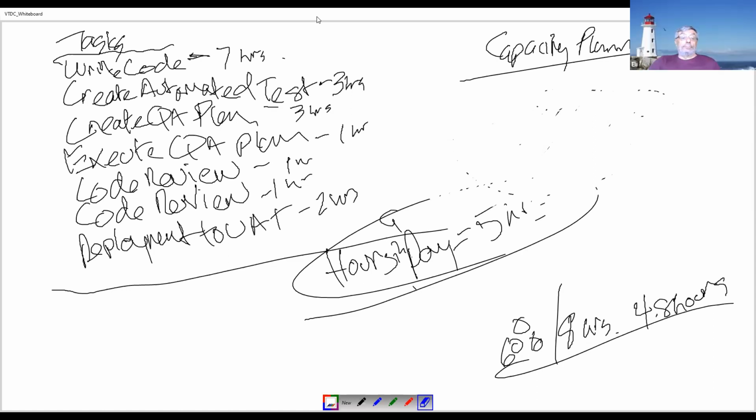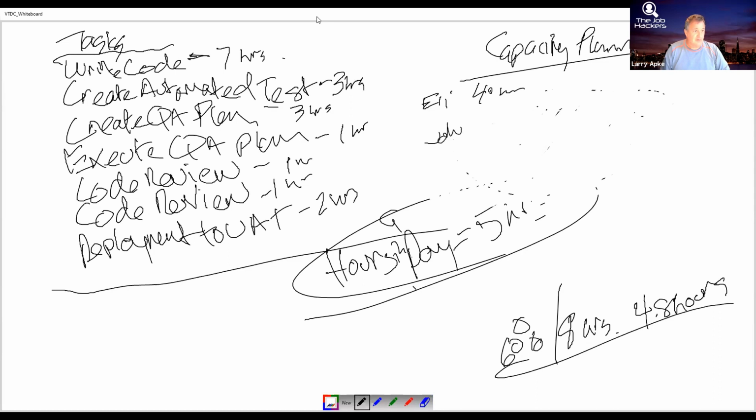Yes. And how many hours are you going to be able to give me over the next 2 weeks? You're going to say, well, Larry, I'm going to take 2 days off. So I can give you 40 hours. Oops, I'm still erasing. Doesn't work that way. Ely, 40 hours. Right? I go to Jamal. Jamal, how many hours can you give me? He said, well, I've got training all next week. I can give you 25 hours.